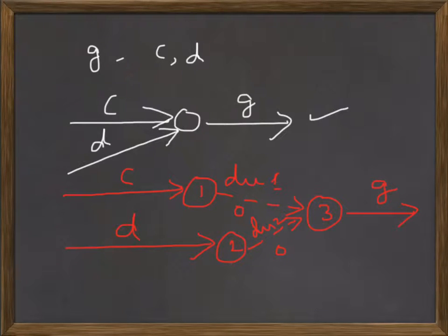Here we don't have to bother about the direction of the activities. Wherever we find that for one activity there are multiple immediate predecessors, from the end point of these predecessor activities, we will just draw dummy activities like this, connect them to one node, and from there we can start the activity which has multiple immediate predecessors. Sometimes use of dummy activities becomes necessary.